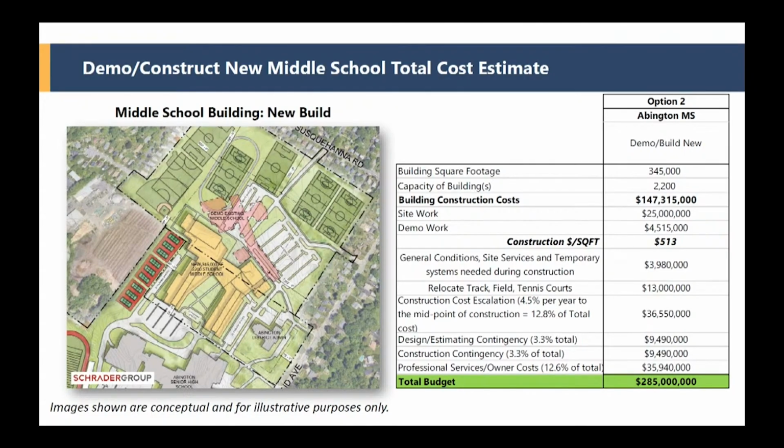So I've heard some comparisons out there. That would be more of an apples to apples comparison. However, we're building this on an active site, right here in the middle of the existing middle school and the existing high school. So there is going to be some temporary construction and roads and all those kinds of things to keep the site operational during construction. So you have to account for that.